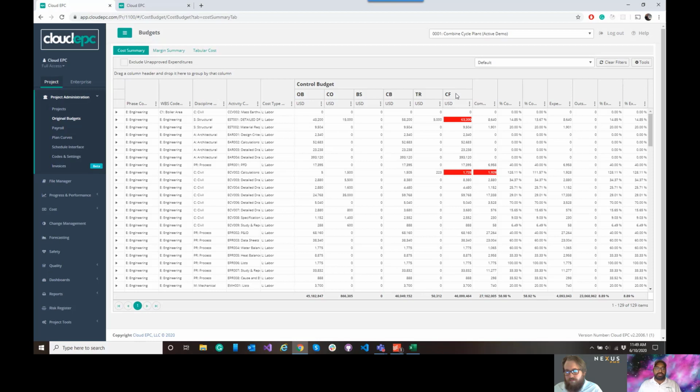When you're running those reports, going back to the previous conversation of coding to your client's budget, you can run a report specifically on just the current budget and hide the forecast from them, as that's an internal report, versus being able to report off the forecast internally for management. So that same data set can be repurposed and used for two different reporting conditions. That's why we have those two different columns. Yeah, thank you. Good question.